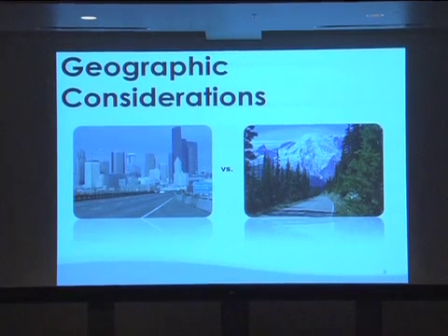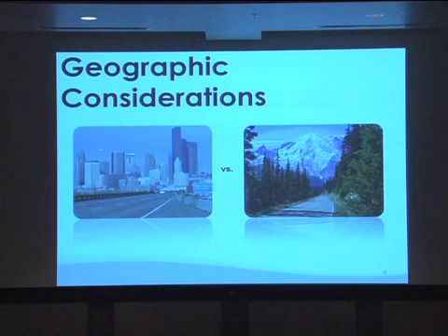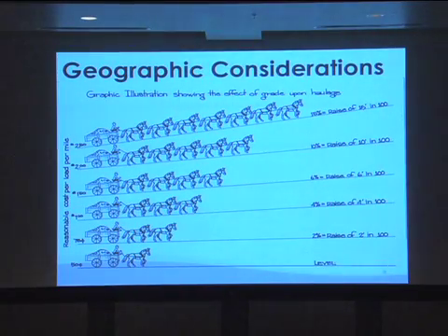And we have to take note of that, okay? This is where we start really getting down there of, am I urban, am I rural? Does the asphalt plant 20 miles away, or are we going to be putting a plant in a quarry near my job site, and so the trucks and stuff can get there quickly? Geographic considerations is more than just where I'm standing, though. It's also about the terrain that the contractor is going to face, okay?